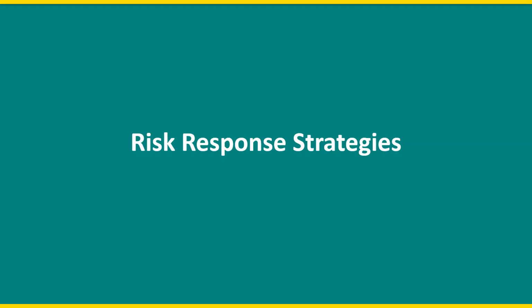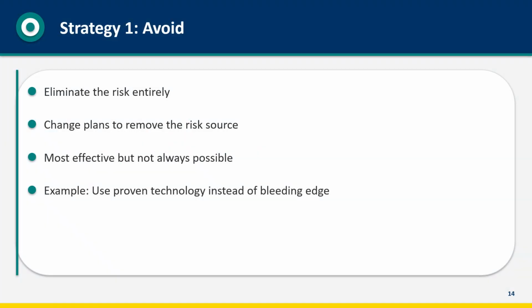Identification and assessment are just preparation. Response is where risk management delivers value. Let's explore the 4 standard response strategies. Avoidance eliminates the risk entirely by changing plans. If a vendor is risky, choose a different vendor. If a technology is unproven, choose a proven alternative. If a timeline is aggressive, extend it. Avoidance is the most effective strategy when available. The risk simply doesn't exist anymore.